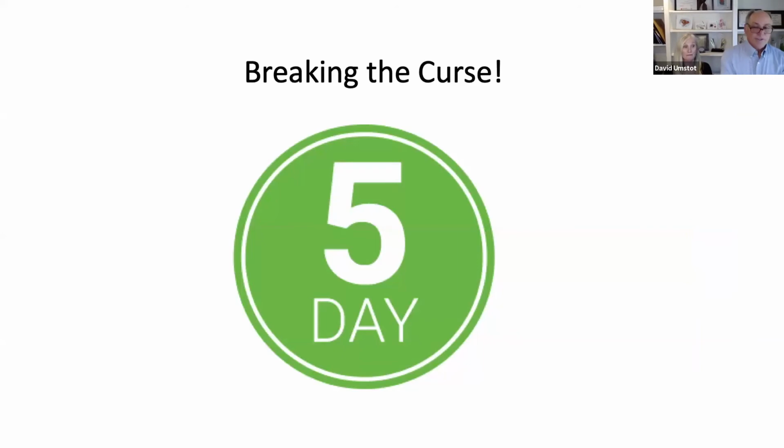Okay, I'll call this breaking the 5-day curse. Whenever we do an initial session with a team, a lot of times I would say probably 90 or 95% of the tags are 5-day duration or a multiple of 5-day duration, as opposed to what they really are. And so people are putting buffer in there.